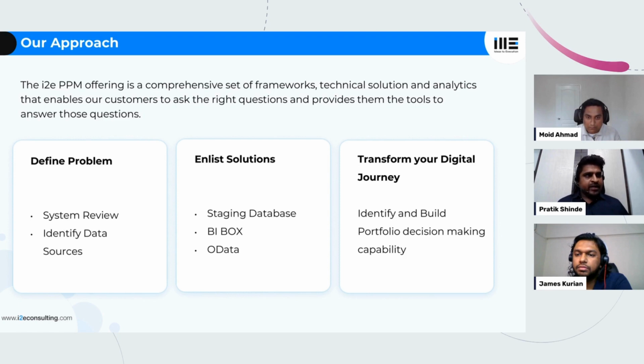However, the disadvantage, if I can say, is probably it doesn't provide you the real-time data that is sometimes crucial for some of the business critical reports, like something like you modify into the system in Planisphere and you immediately want it to be reflected into the report. So this approach usually is not suitable in that case. However, it's a very time tested approach, and most of the time 90% of the problem is solved by having this staging environment set up in your organization.